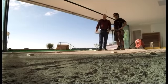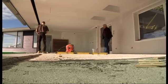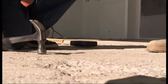We also need to make sure that there's no underlying moisture issues. With floors of this age, moisture can be a real issue. You don't know whether the polythene that's underneath the floor or the moisture barrier is functioning. So it is quite important before you repair it that you know whether there's a moisture issue or not. So, the agony continues as we await the results of the moisture levels before we know our next move here. Man, this living room floor problem just keeps on hurting.